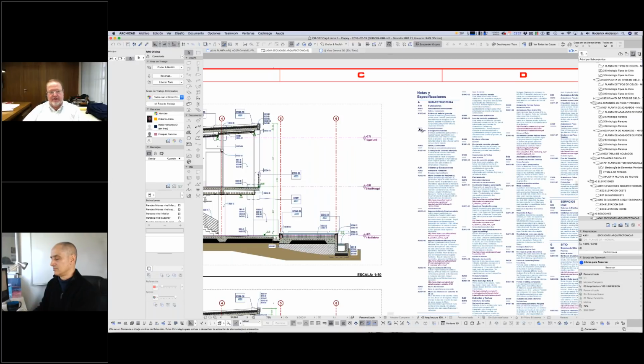So let's say instead of me telling a client that a certain project is going to have X number of tons of concrete, I'd rather tell them where that concrete is going. So I'd rather tell them how much concrete is going into the walls and how much into the slabs and how much into the footings, and then break it down into each footing type and each wall type and so forth. And that makes more sense with stuff related to finishes and so forth. So I ended up gravitating to the unit format standard because of that.